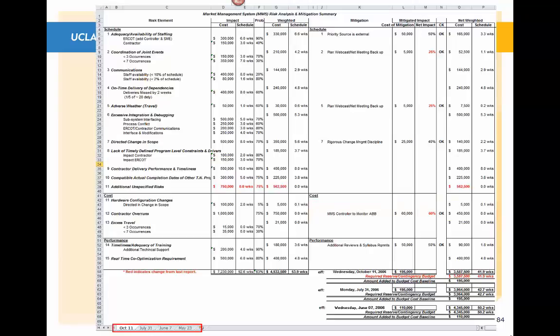And again, in the lower left hand corner, I wanted to point out to you that this is October the 11th when this picture was taken. And so you can see now we have 4 months of pictures. You also can note that in this particular project, the project manager's decision or judgment, mine, decided that to update these risk assessment sheets and review them on a specific formal basis did not have to occur every month, but at least about every couple of months or whatever, they should be reviewed, and they were reviewed.